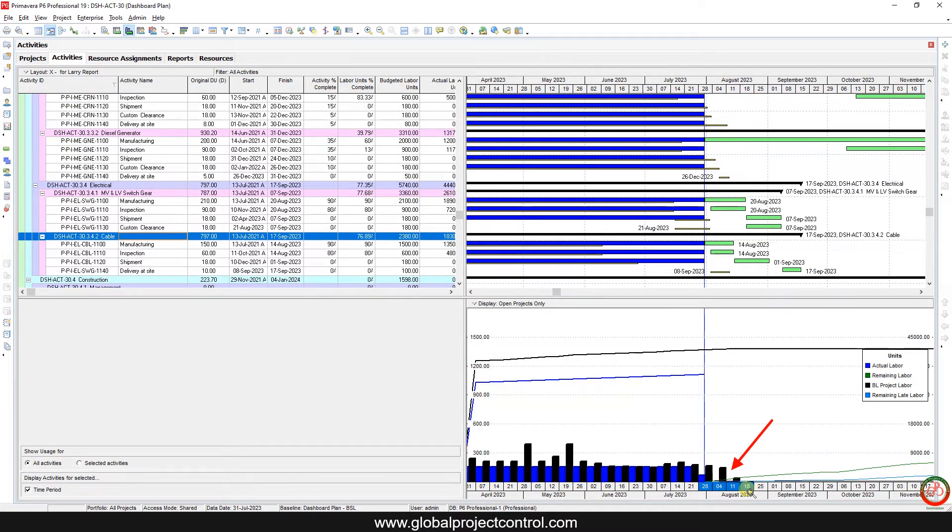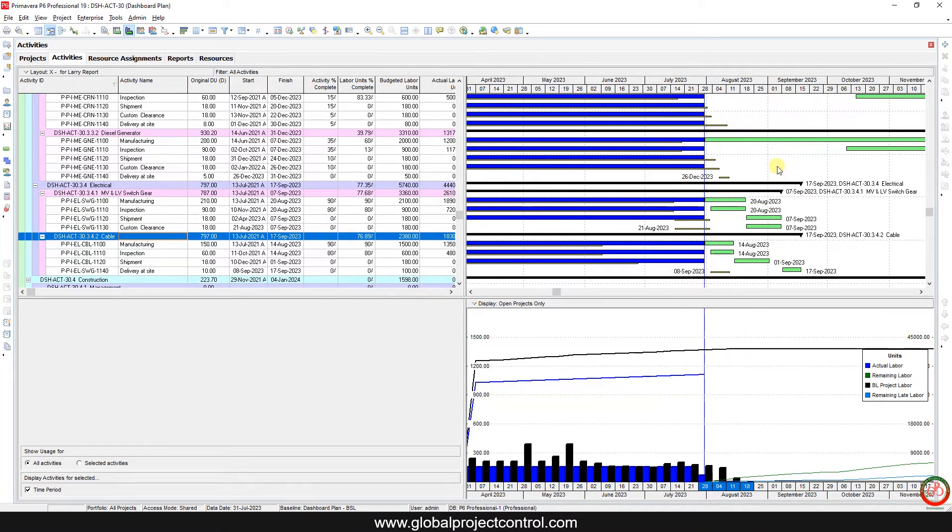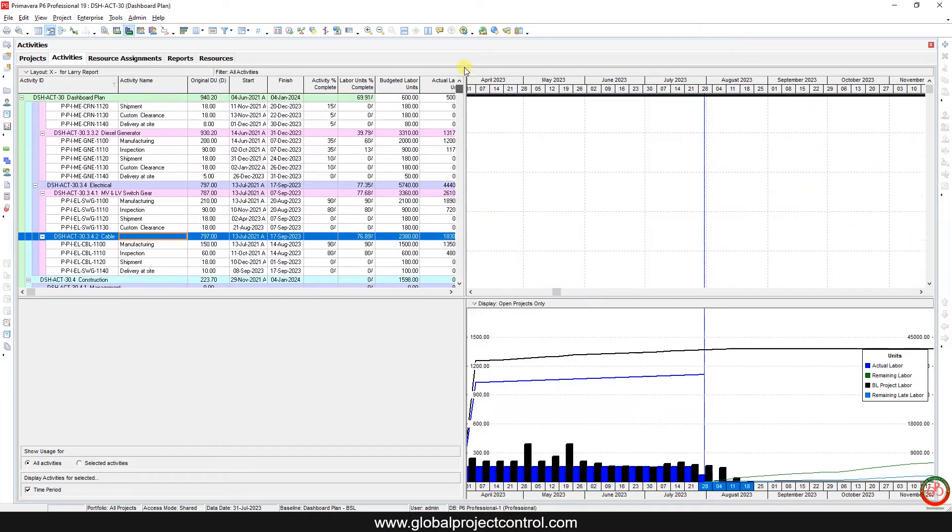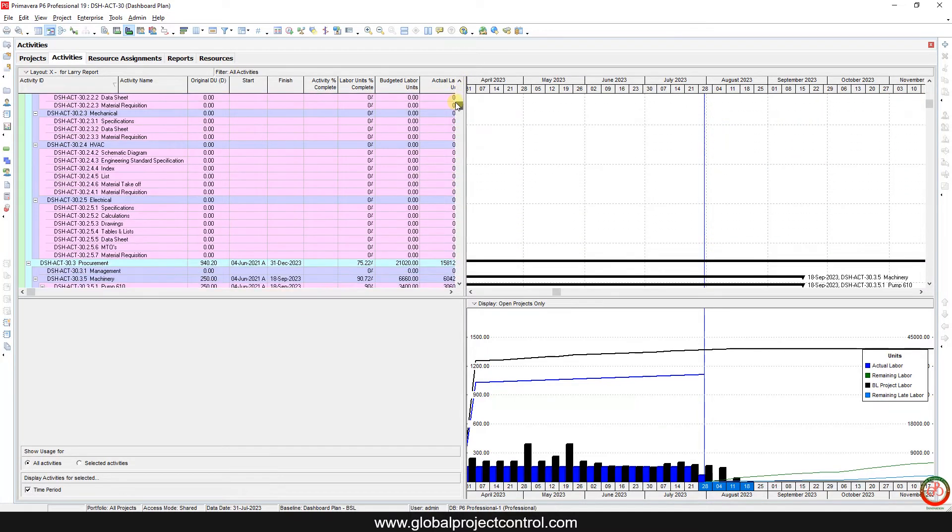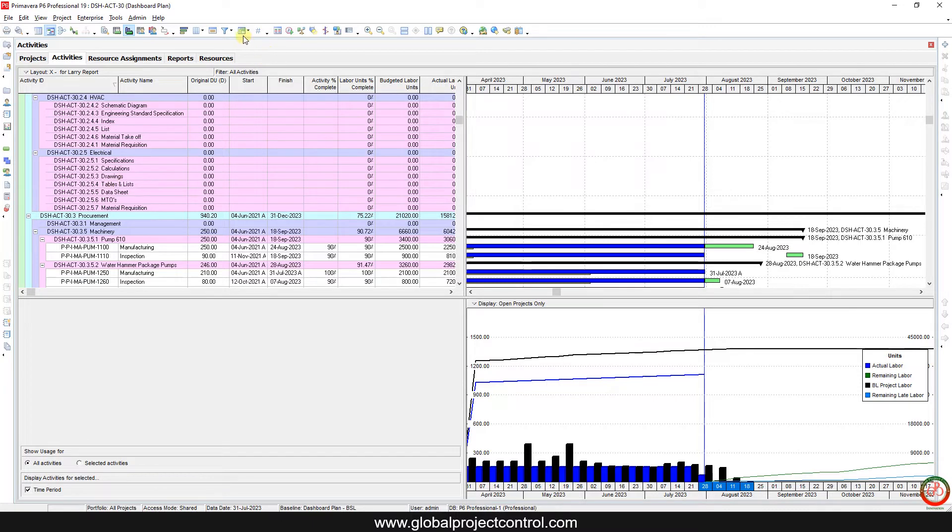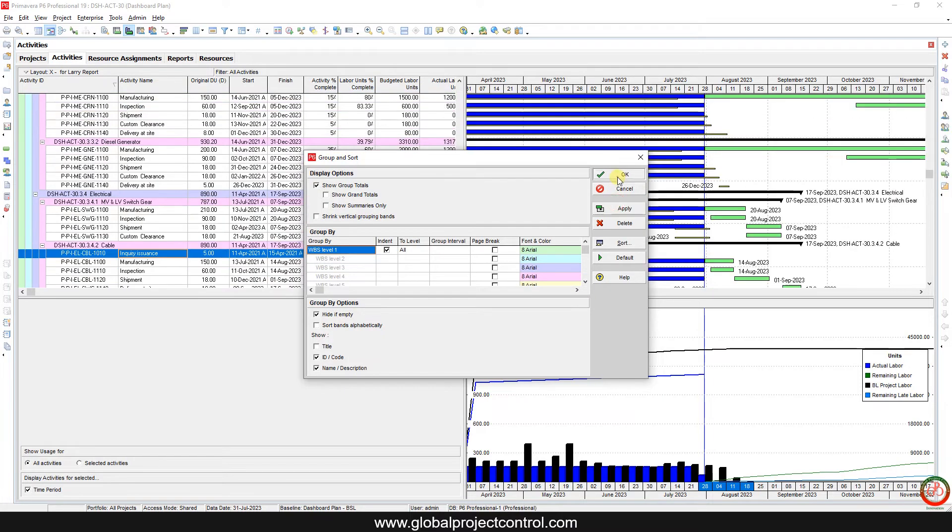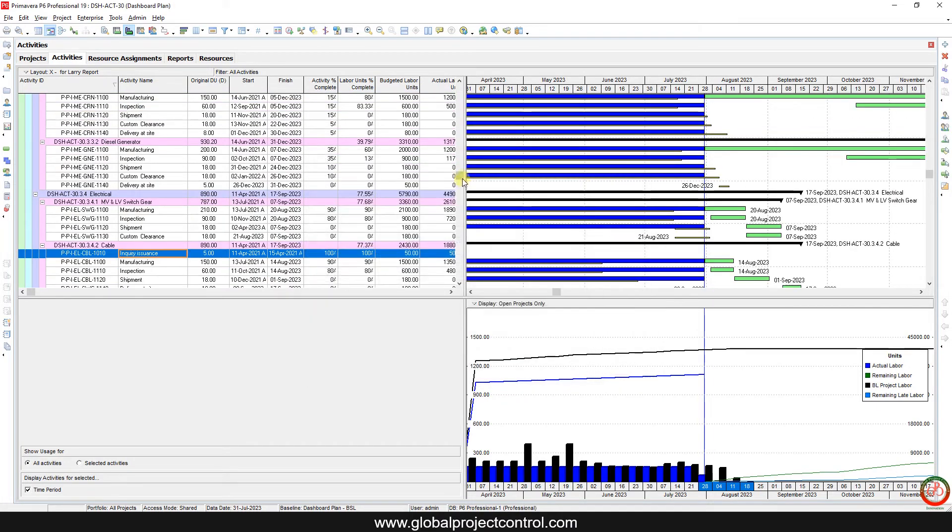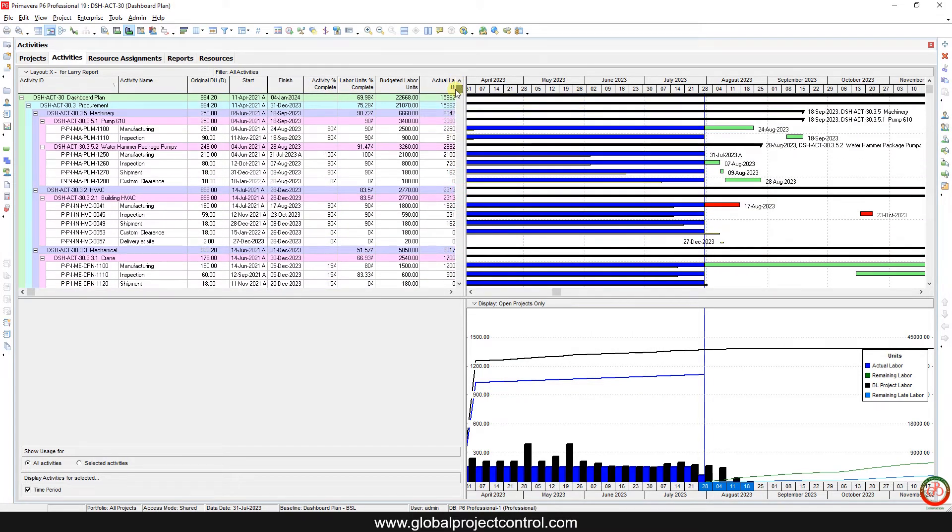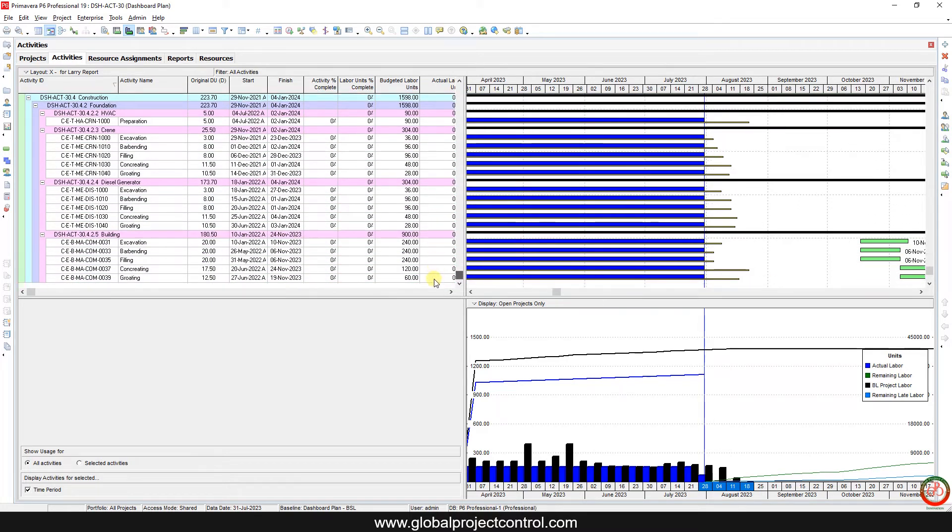If your baseline or your estimate is located on these four weeks, then activity is going to be listed in the above. Now I create a list and this list of tasks are sorted based on these items. As you see, I don't have anything for this part of the schedule, so it is better to go to the group and sort and use the hide if empty. Then it will be sorted based on your available information which is related to this four weeks.